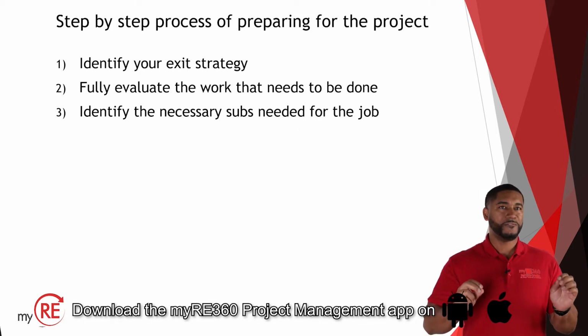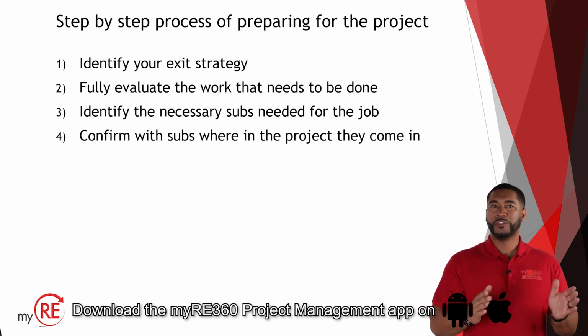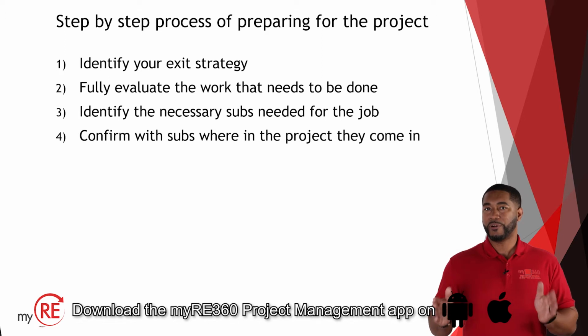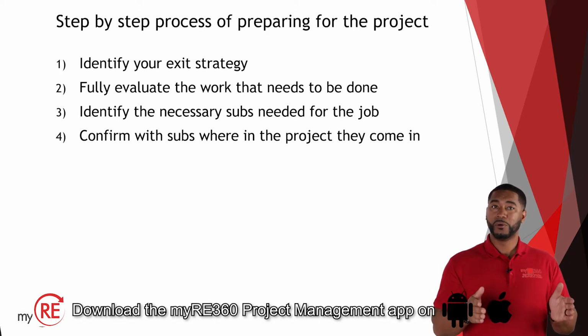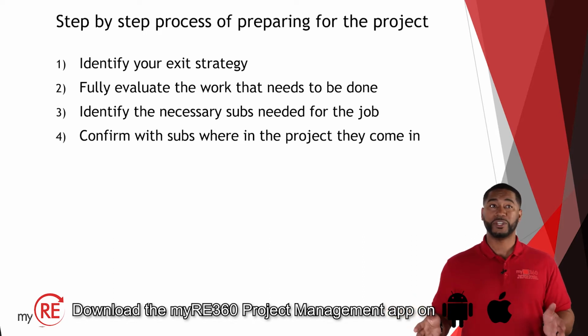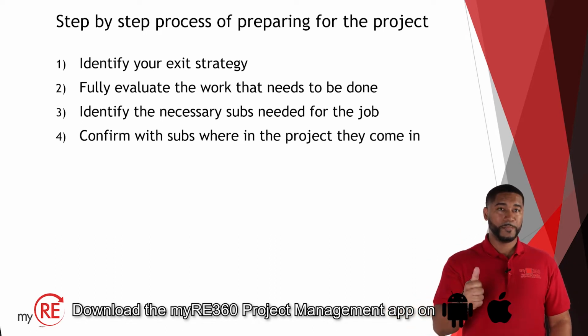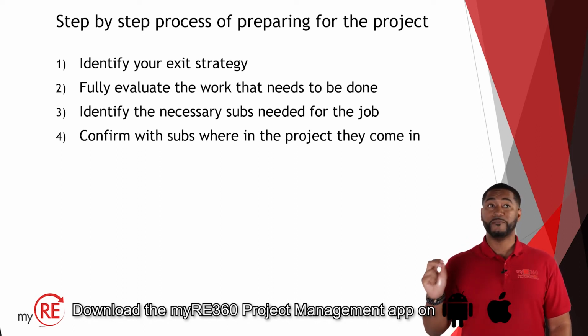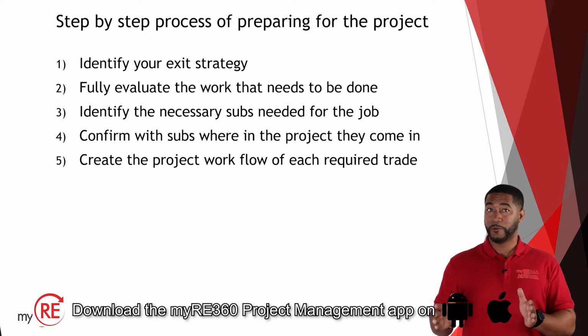Now, once you've identified what subcontractors are needed, you then want to confirm with those subs where in the project they'll come in. Are they going to be in the beginning, middle, or end part of your project? Once you identify what subs are needed and where in the process they're going to be involved, you need to actually create the project workflow of each of your subcontractors.